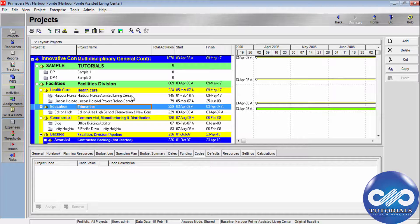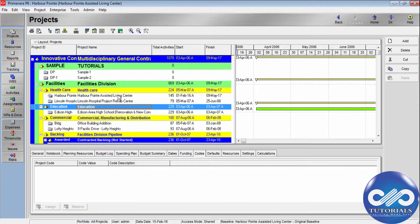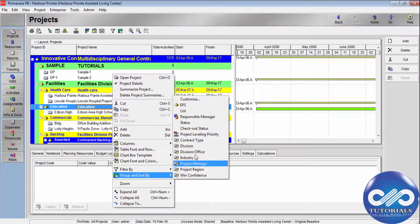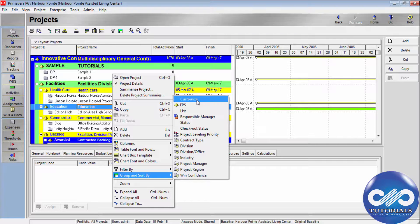Now let's see how to group and filter by project codes. Use this to group and sort by project codes, or you can even customize this. You can add additional codes or project elements in your layout. The module creates a group band for each group-by parameter you select in the Group and Sort dialog box.